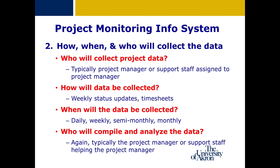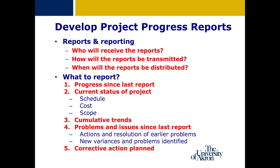It's typically the project manager who will need to pull this data together and analyze it, and the project tools can help with this to quite a degree. You'll be expected to provide various forms of status reports with the content and structure based on the audience. Generally, the status report should list specific items completed or started since the last reporting period, the current state of the project, upcoming tasks for the next reporting period, and an outline of all problems and issues that need to be addressed, and if possible, how those issues will be addressed.